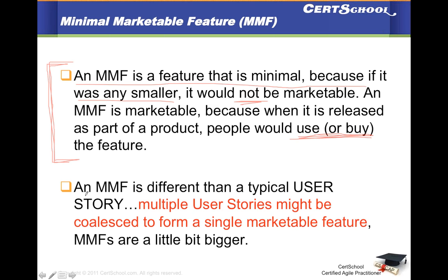Another way of looking at it is, an MMF is different than a typical user story. Multiple user stories might be coalesced to form a single marketable feature. So MMFs are a little bigger. There are organizations which use it. There are organizations which do not use it. It's really up to your discretion, depending on how your sales and marketing approaches the customers.